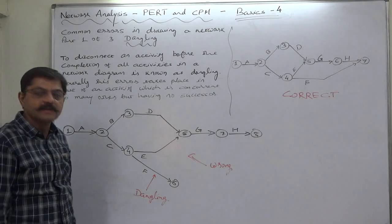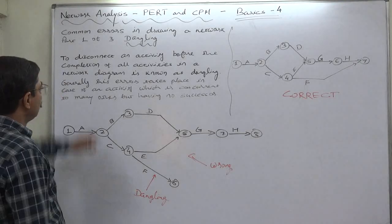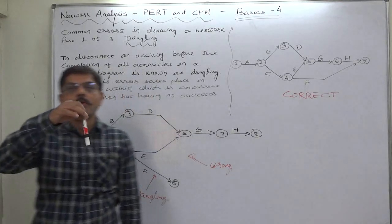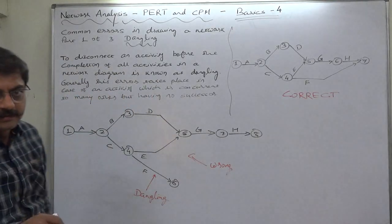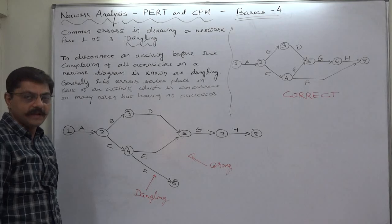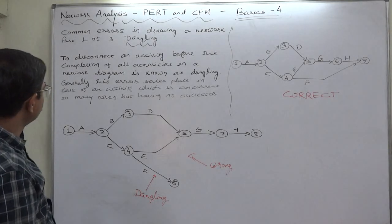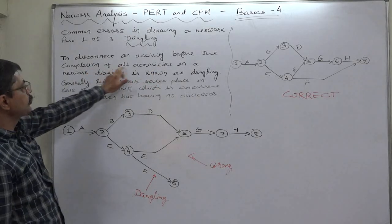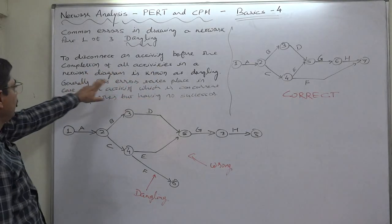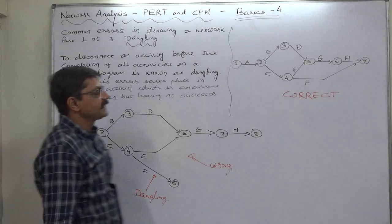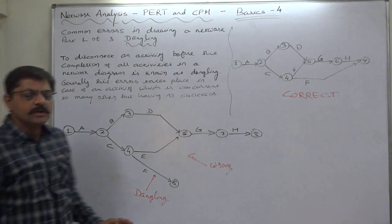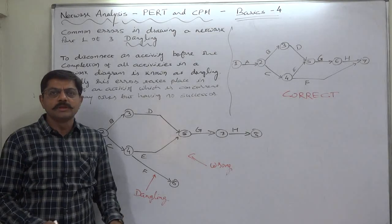...types of errors which are possible. The first is dangling. Dangling means to hold something loosely—that is the dictionary meaning. But here in network analysis, to disconnect an activity before the completion of all activities in a network diagram is known as dangling. That means it is something like leaving something incomplete.